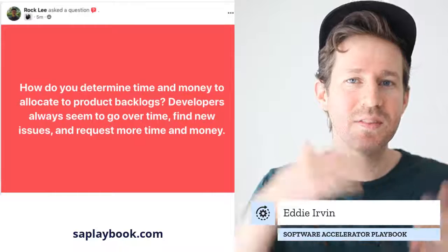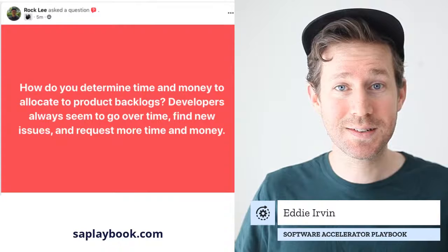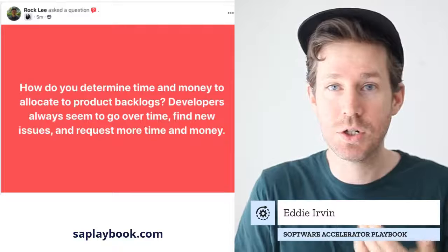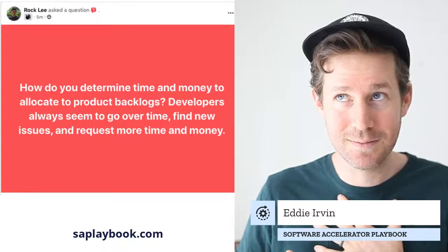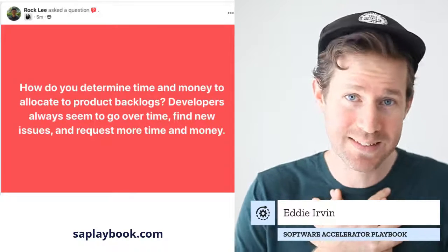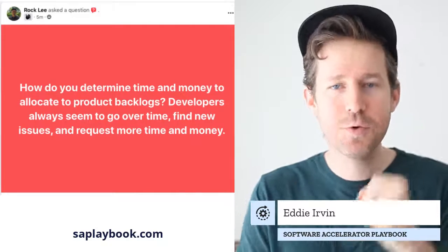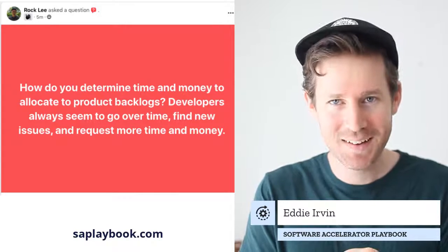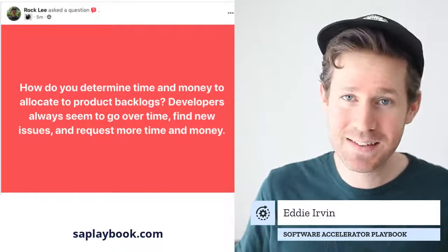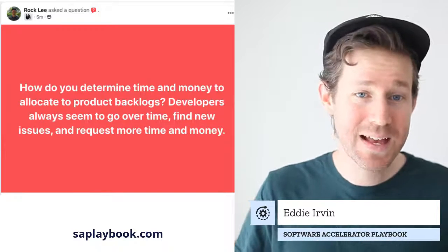Now, if you want to make your product better, and you've got these certain things that you kind of want to do, and it's always this rotating list, I've also heard it recommended to just cut off the backlog, and if it hasn't been done already, then just don't do it. When I first saw that kind of advice, I was thinking, oh gosh, no, if you put it on the list, there's a reason it's on the list. But there is some credence to the idea that if you don't have to fix it right now, then maybe it's just not as important as you think it is. And if it's going to stay on the list for a month, 2 months, 3 months, and not get fixed, then maybe it's just not that important.